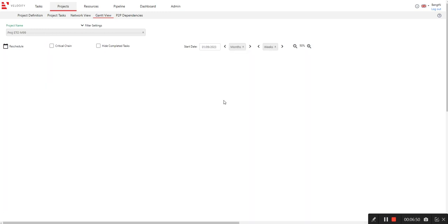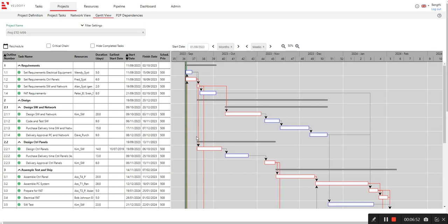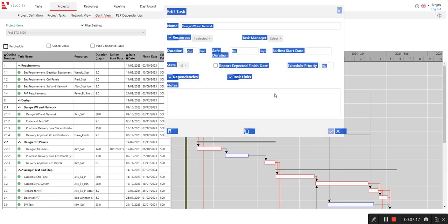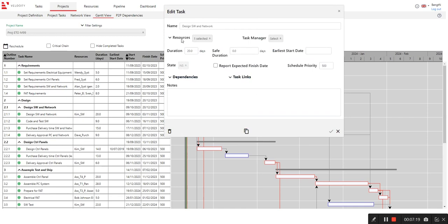So let's have a look at the full network again. We see we have one chain of events down here and another chain of events up here. And these two are now interconnected via Kim. So if we can offload him here, this chain of events up here can continue without interfering with the chain down here. Okay, so let's find someone else to do Kim's job here.